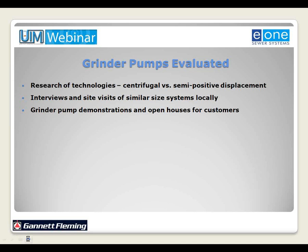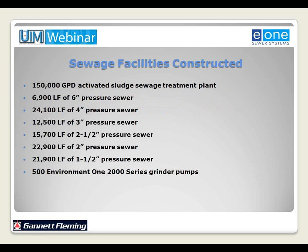So with all that being said, the sewage facilities were constructed. Again, we had a 150,000 gallon per day activated sludge sewage treatment plant, 6,900 feet of 6-inch pressure sewer, 24,100 feet of 4-inch pressure sewer, 12,500 feet of 3-inch pressure sewer, 15,700 feet of 2.5-inch pressure sewer, 22,900 feet of 2-inch sewer, and 21,900 feet of 1.5-inch pressure sewer.